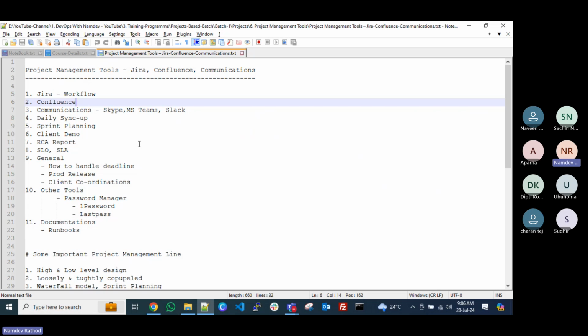In the daily sync up, you might also be attending the daily sync up. Daily sync up is basically just to take the updates and give the updates. Let's say you are working on something like infrastructure or pipeline setup. Whatever task we have done, let's say yesterday, in today's daily stand up call you need to update that. Like, I am working on this Jira ticket. I have done this exploration. I read this documentation. I tried to set up, writing the Terraform code. I'm trying to debug some minor issues, and I'm trying to deploy those changes by using the pipeline. So whatever the updates are, you need to give them in that daily sync up call.